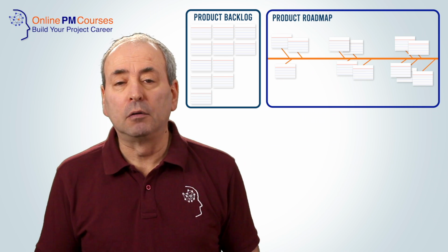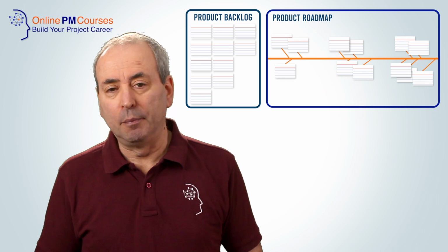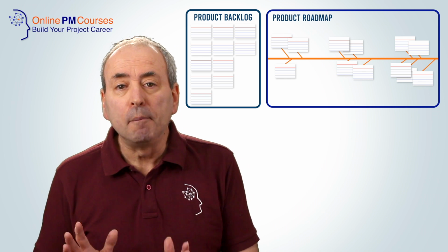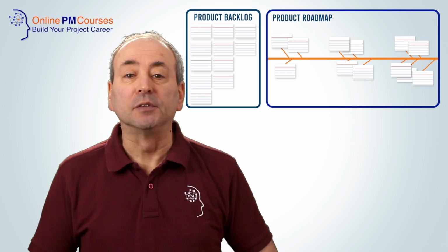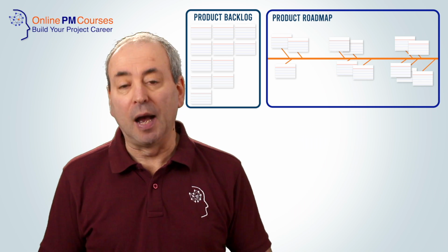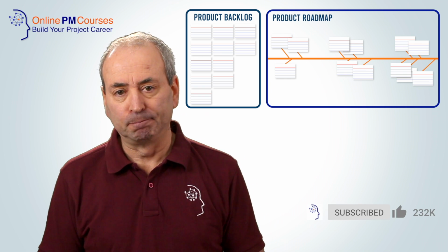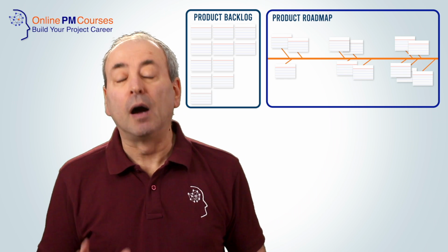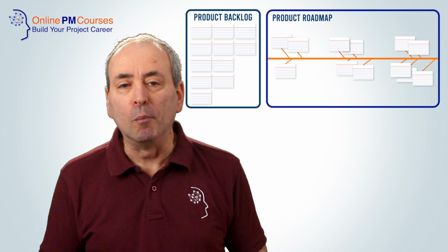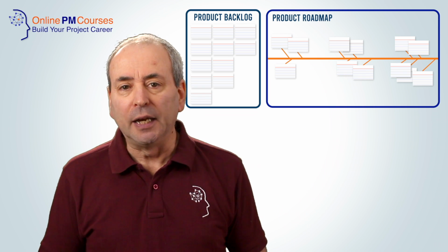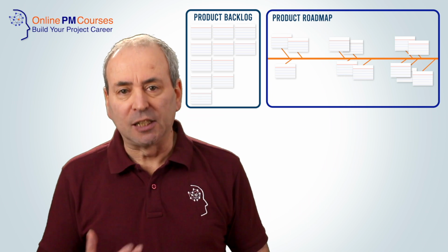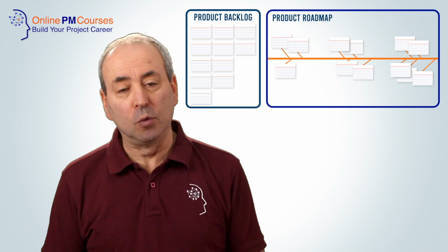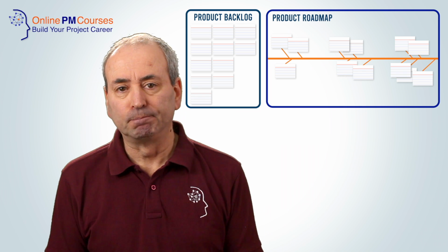As the backlog grows larger, it becomes increasingly important that product owners impose some order on it, perhaps labelling some items as near-term, medium-term and long-term features. Near-term items on the backlog will have a lot more detail attached to them, including a full user story and possibly some substantial estimates of how much time it will take to develop the feature.